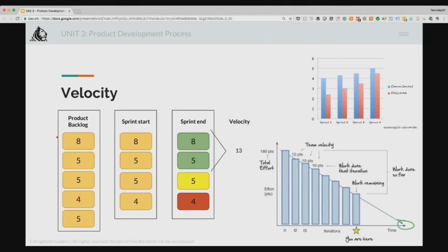But the end goal as an agile owner, my task is to get a task done, right? So the best way to look at this is, instead of looking at the number of hours, just look at the complexity of the task, right? It's looked at in this manner because for a person who is an expert, who will say it will be done in 2 hours, the complexity might be just 1, correct? And for somebody who says it's going to take 4 hours, the complexity could be 2 or 3. It's a complexity 2 level problem or a complexity 4 problem or whatever, right?